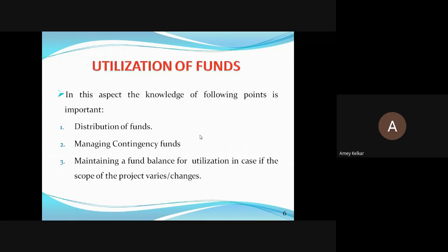So if our estimates are done by a rookie engineer who doesn't have exact idea, or say the material gets wasted and we require some emergency material, and already material is purchased, then at that time we cannot stop the work as material is not there. So what we have to do? Use this contingency funds. Secondly, the equipment can get damaged.